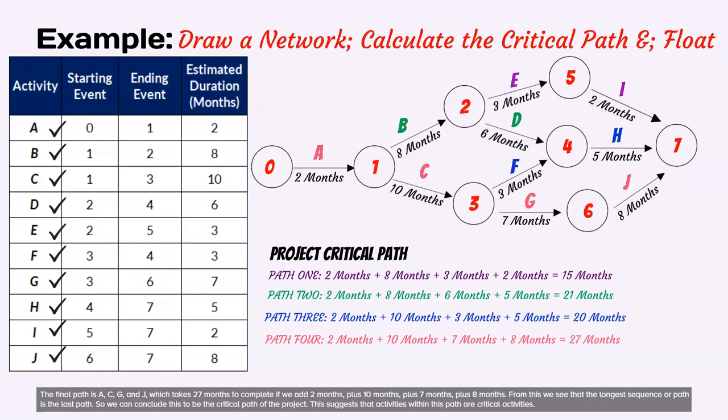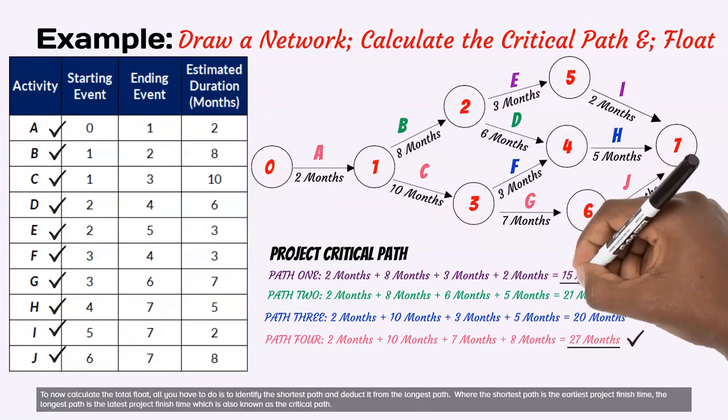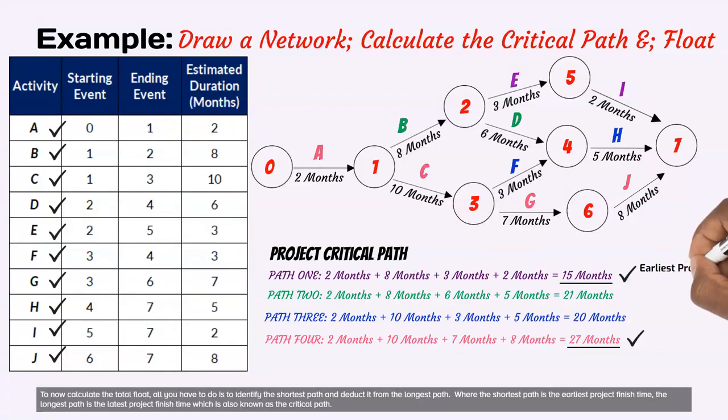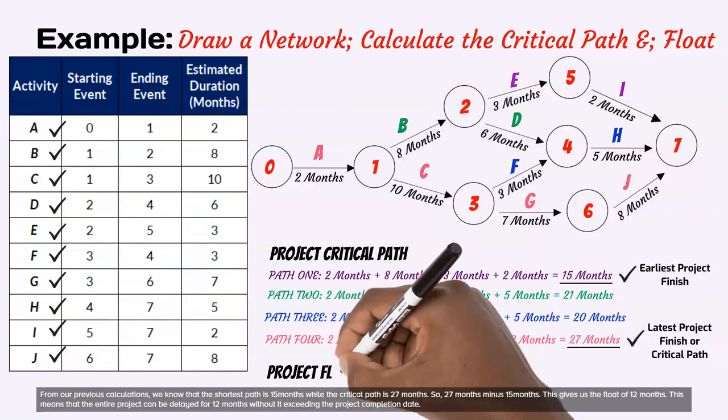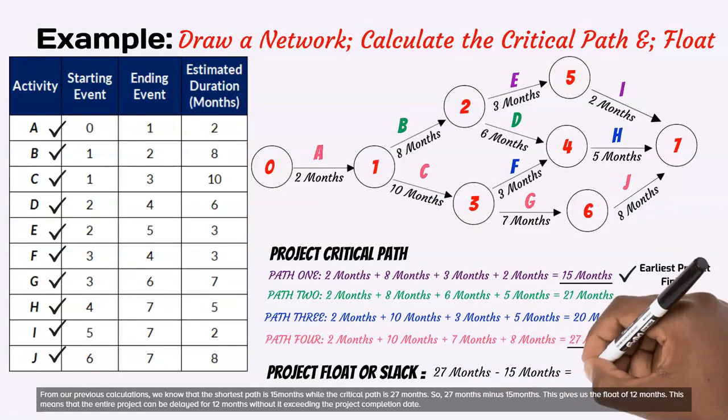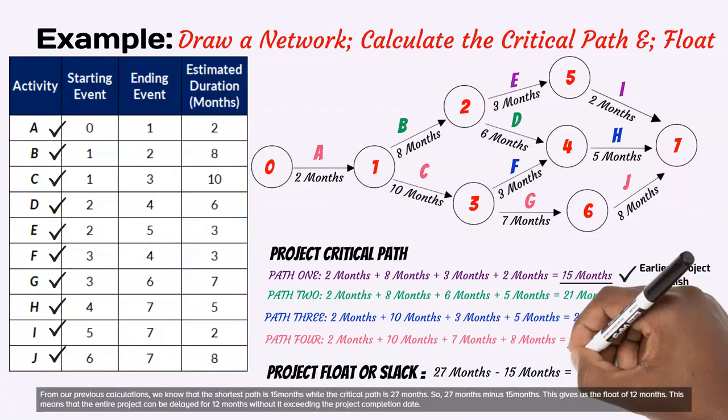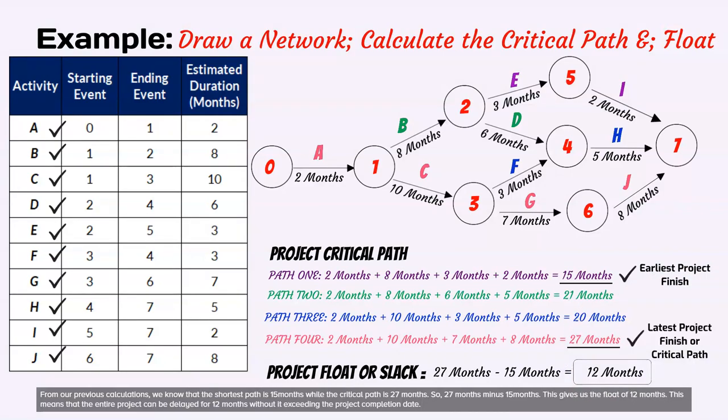From this we see that the longest sequence or path is the last path. So we can conclude this to be the critical path of the project. This suggests that activities within this path are critical activities. To now calculate the total float, all you have to do is identify the shortest path and deduct it from the longest path. Where the shortest path is the earliest project finish time, the longest path is the latest project finish time which is also known as the critical path. From our previous calculations, we know that the shortest path is 15 months while the critical path is 27 months. So, 27 months minus 15 months. This gives us the float of 12 months. This means that the entire project can be delayed for 12 months without it exceeding the project completion date.